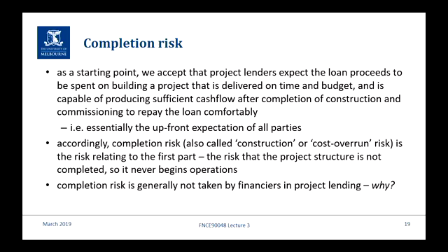That's the economic outcome of the limited non-recourse arrangement, and that is that during construction, the contingent recourse is there. So the lenders are lending to the project for construction, but really the only risk they're taking is operational risk. They're taking the risk that the future cash flows won't pay them back. They're not going to take the risk that you don't even get to future cash flows.